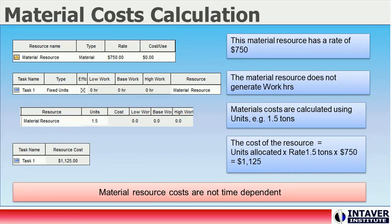Another type of resource is material costs. Material costs are not based on work and therefore not time-dependent. Material resource costs are calculated on a rate per unit — for example, in a particular activity you could have a material cost of x amount per ton. The material resource is assigned to an activity with a unit value, and the cost is then allocated to the activity based on the rate and the unit value.